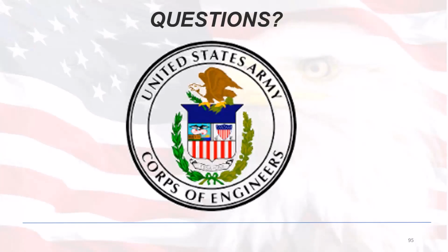Usually when you're doing an SDEF import, RMS treats that SDEF file as the system of record. So anything in RMS that's not in the SDEF file will get wiped out or changed from the SDEF file. But it will let you know when you do that import. It won't be a pop-up warning, but it will be a red flag on the comparison sheet saying this is going to change when you do the SDEF import.